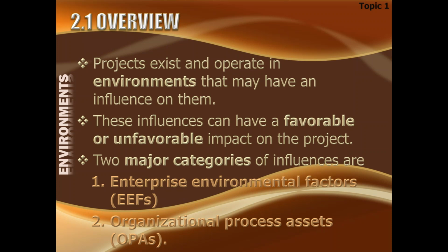If there is an organizational policy, or procedure, or rule, or regulation, these are things you can't change, but you are supposed to follow. These are unchangeable, and they are read only. Then there are certain things which you not only can follow, but if you like, you can update them also. It is like the old records of previous projects.